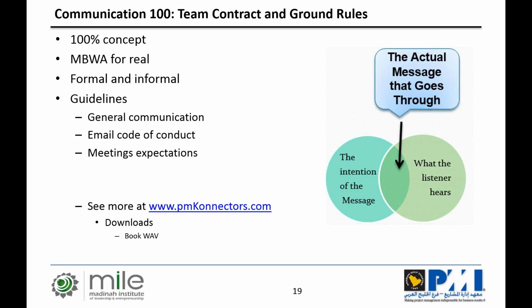And these are perfect poka-yokes, so what we do and don't do, and what we should expect. For example, with the email, let's establish that you'll respond to my email within 24 hours, unless, of course, you're out of office and then I'll know about it. And if you don't respond after 24 hours, I will assume that you haven't received it, but this will reduce the need, for example, for me to send you read receipts and all sorts of other annoying things.